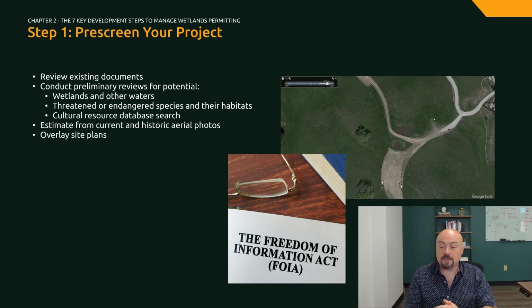We recommend involving an experienced wetland delineator in this discussion to confirm your findings and then draw preliminary boundaries around them on a map. In general, if you want to avoid permits, you need to avoid these areas. It's really pretty simple. You will also want to discuss the potential for threatened and endangered species habitat with a biologist.